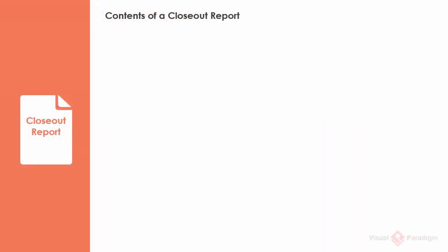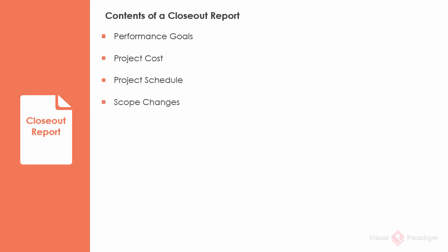Let's take a look at the contents of a typical closeout report. Performance goals: describe how the project performed against each performance goal established in the project performance plan. Project cost: state the planned and actual cost of the project, documenting variances and explaining why they exist. Schedule: document the initial approved schedule baseline against the actual completion dates, describing schedule variances with explanation. Scope changes: document any changes to the project scope and the impact on performance, cost, or schedule baselines. Project resources: identify to whom each project resource was transferred and when, and account for all project resources utilized.